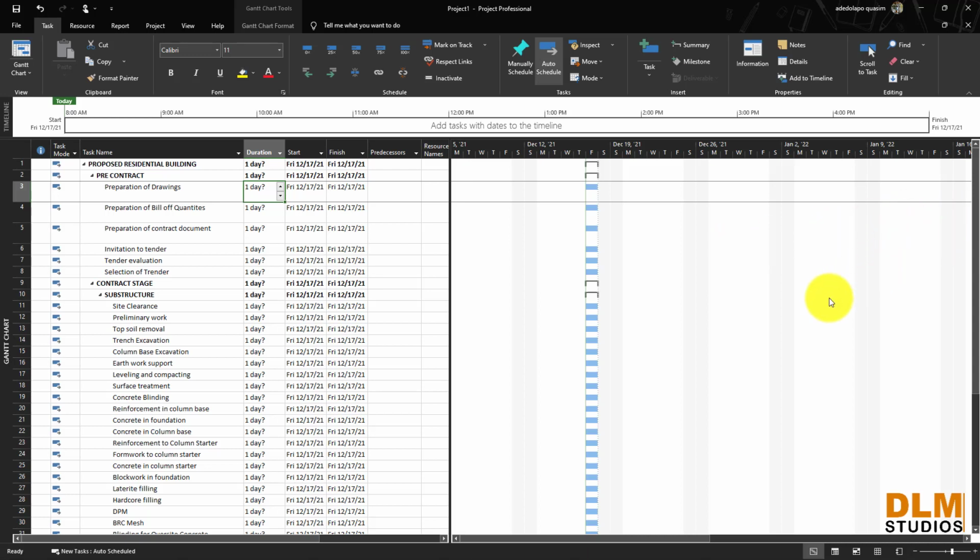That will be 8 times 300 divided by 10. You can just pick your calculator and do that. Let's quickly do that. Where's my calculator? Okay, found you. So that's 300 meters square times 8 divided by 10, which takes one person 240 hours. Divided by 8, that will be 30 days for 300 meters square, which is not reasonable.